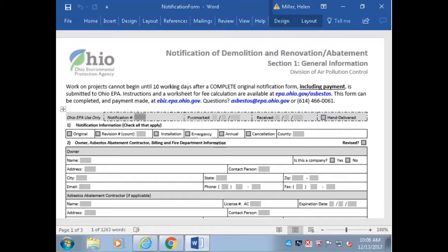One big difference with fees is, if it's a project that has over 50 feet, the licensing rules will apply, and you'll have the $65 for each address under that notification. You've got a $75 NESHAP notification if it's either a demolition or abatement that's over 160 square feet, 260 linear, 35 cubic. And then the RACM fees will be calculated and charged up front.